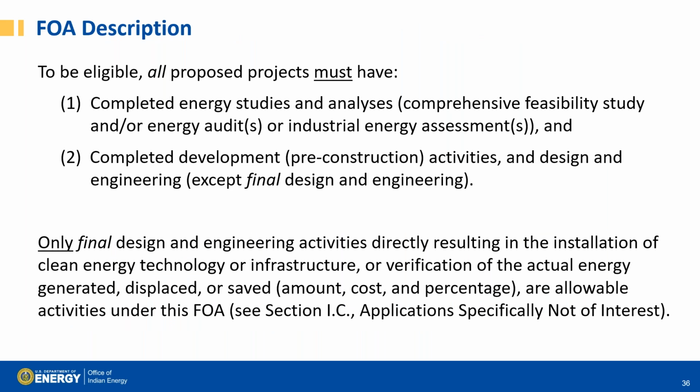Okay, so to be eligible, all proposed projects must have completed energy studies and analysis, which could either be a comprehensive feasibility study or, for energy efficiency measures, an energy audit or industrial energy assessment, and have completed development or pre-construction activities and design and engineering, all except for final design. So you must have completed your studies and your design prior to submitting an application. Only final design and engineering activities are allowable under the FOA.